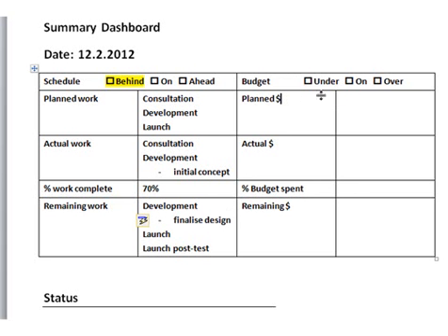Okay, we then look over here at the budget side. So again, we're going to have to state whether we're under, on, or over budget. So for this particular project, I have a $12,000 budget. At this date, this point in time, 12th of the 2nd, I'd plan to spend $10,000. So I'm going to pop that in here. The actual amount I've spent is $8,400. And the percentage of budget that comes out to being is 70%. And the remaining budget is 3,600. So as you can see, I'm just putting my comma in, as you can see here, I'm actually okay budget wise. So I can say that I'm on target where the budget's concerned.